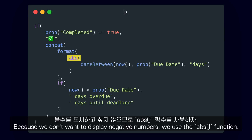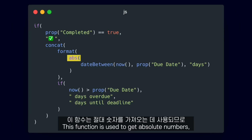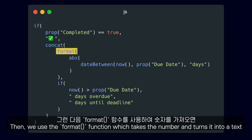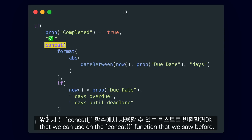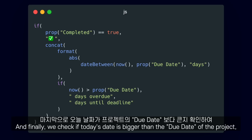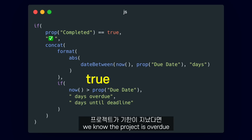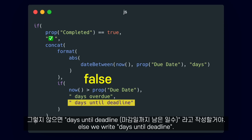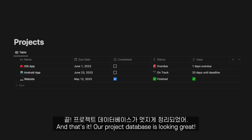Because we don't want to display negative numbers, we use the abs function. This function is used to get absolute numbers, which means that if we give this function minus one, it will return one. Then we use the format function, which takes the number and turns it into a text that we can use on the concat function we saw before. And finally, we check if today's date is bigger than the due date of the project — we know the project is overdue — and so we attach a 'days overdue' text, or else we write 'days until deadline'.